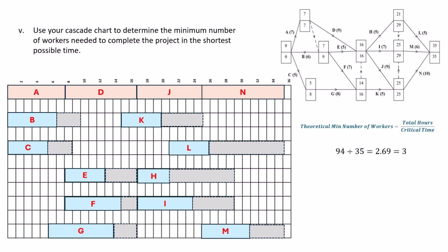So the absolute minimum number we could, in theory, use will be 3, but let's see if that actually works out, because it really depends on the activities, what they're dependent on, and so much else. So this is theoretical. What I'm going to do is start with my critical path and assign that to a worker. So that is my first worker. Then I just work with each of my activities and try to assign activities to each worker one by one.